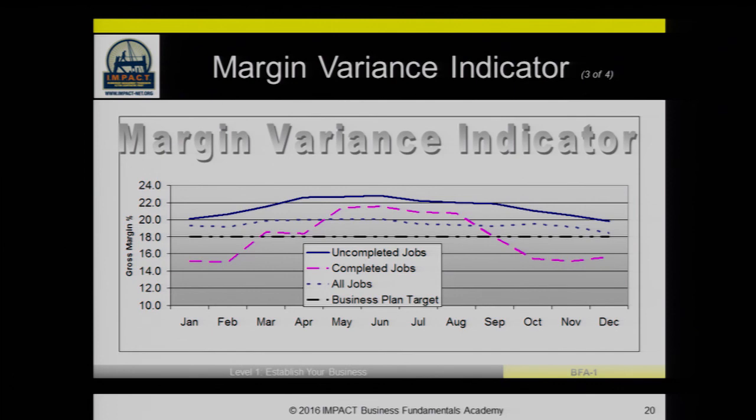And contractors that really don't understand their cost or don't really understand earned value a lot of times have trouble with margin fade at the end of a project. What it means is they're not really assessing what the productivity rates are, what the work installed rate is, and that the margin is going to fade at the end of the project. The better contractors, the best of class contractors, tend to be a little more conservative, and at the end of their projects, they'll have actual write-ups on projects where the margin goes up on the job. And so what we're really trying to track here is just what's happening with each particular margin, whether it's completed or uncompleted, and are we gaining or fading on our margins?